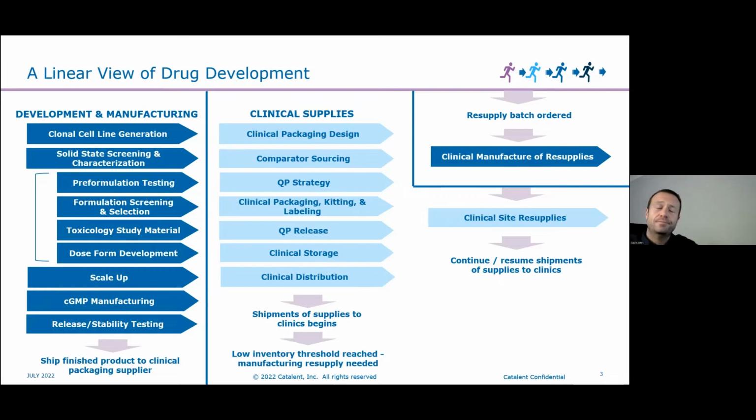clinic. So on the screen now is a typical linear timeline where you look at development of your drug, manufacture of your early phase product. So working on one part of the project at a time. So you start with development. Once that's completed, you go to your drug substance process development, manufacturing, look at the manufacturing approach and understand where the quality attributes, inputs and outputs are identified. And when these activities are completed, the next phase is then to perform the scale-up.